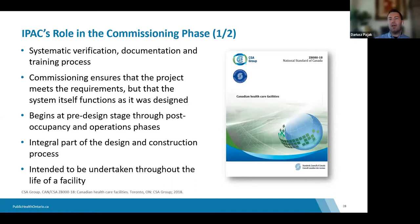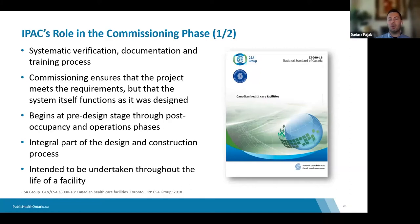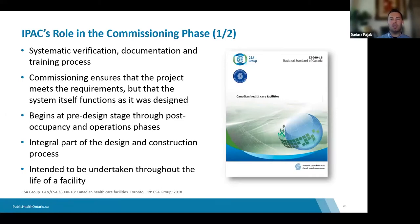For example, if your facility is installing window air conditioning units throughout, who is going to maintain them? Is there sufficient capacity with the facility staff to actually clean pre-filters and maintain those systems safely? If those individuals aren't at the table to verify they can maintain the systems and collaboratively develop policies and procedures, it raises red flags. This needs to be addressed in the planning phase before systems are installed.